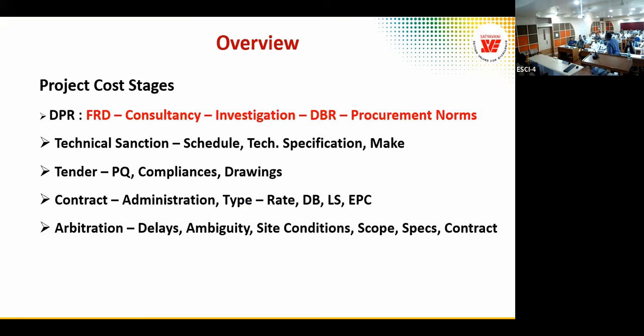So what I'm trying to say is, in the tender procurement pre-qualification, we also have to collect the current situation data. In spite of that, when I wrote to 32 companies across the country to participate in my tender with that stringent PQ, because the client was worried, you have put such a stringent PQ, who will quote? 20 companies participated in the tender out of 32. I had written mails to them. So a consultant can do so much in a project if he is committed to deliver the project.